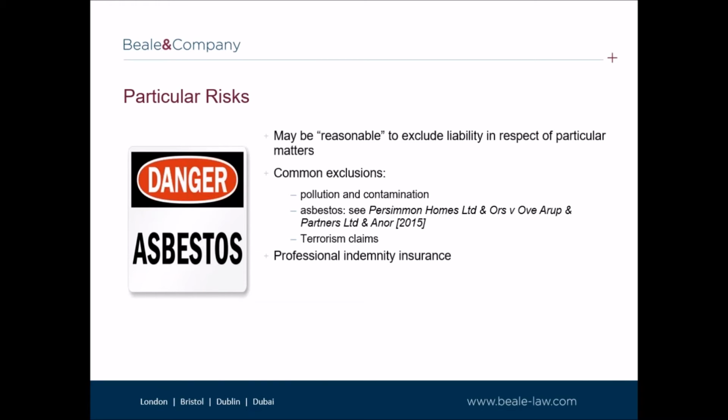Now moving on to particular risks. In some cases, it can be reasonable under UCTA to exclude liability in respect of particular claims and matters, and where appropriate, consultants should do just that. The circumstances in which it would be reasonable to exclude such liability might be where it is agreed by the parties that a third party or client is to take on that risk. Common risks which are excluded include pollution and contamination risk, asbestos, and terrorism claims.